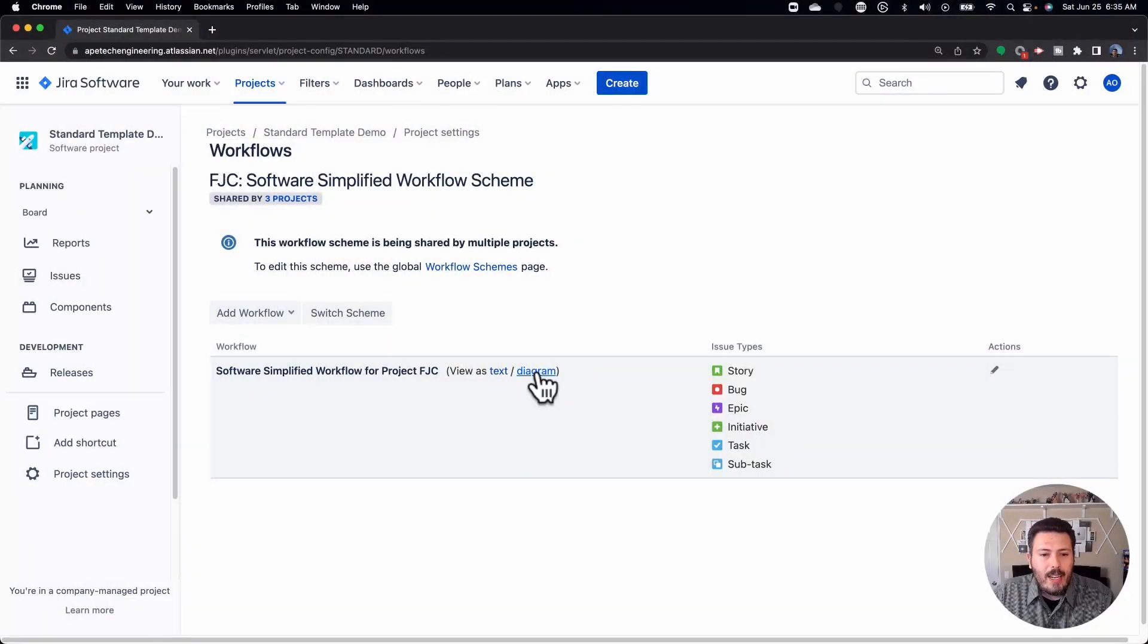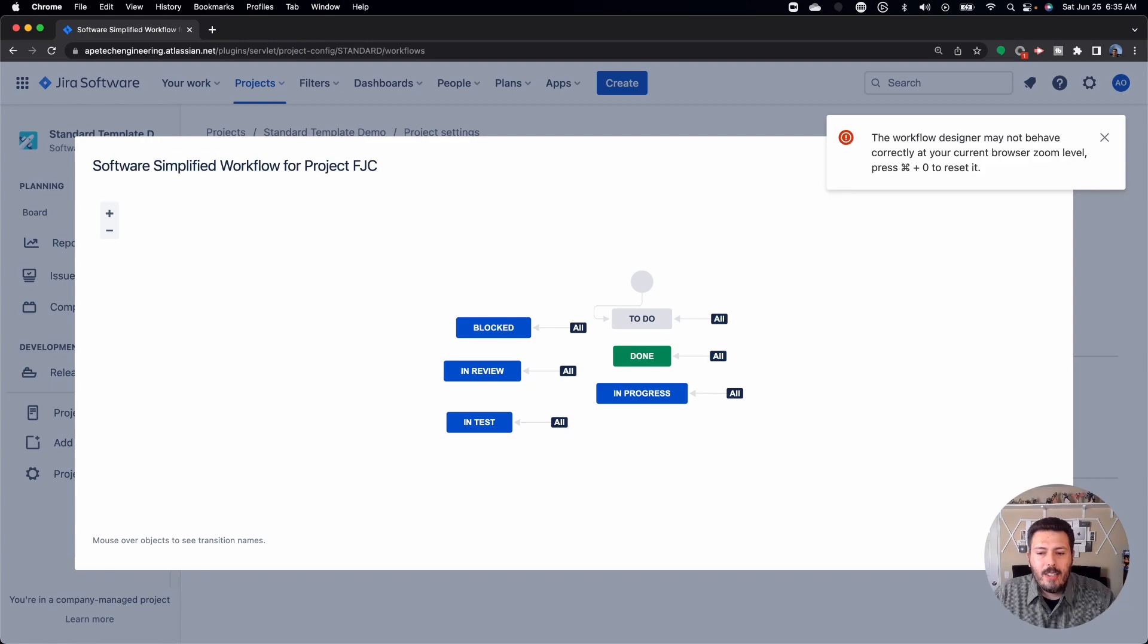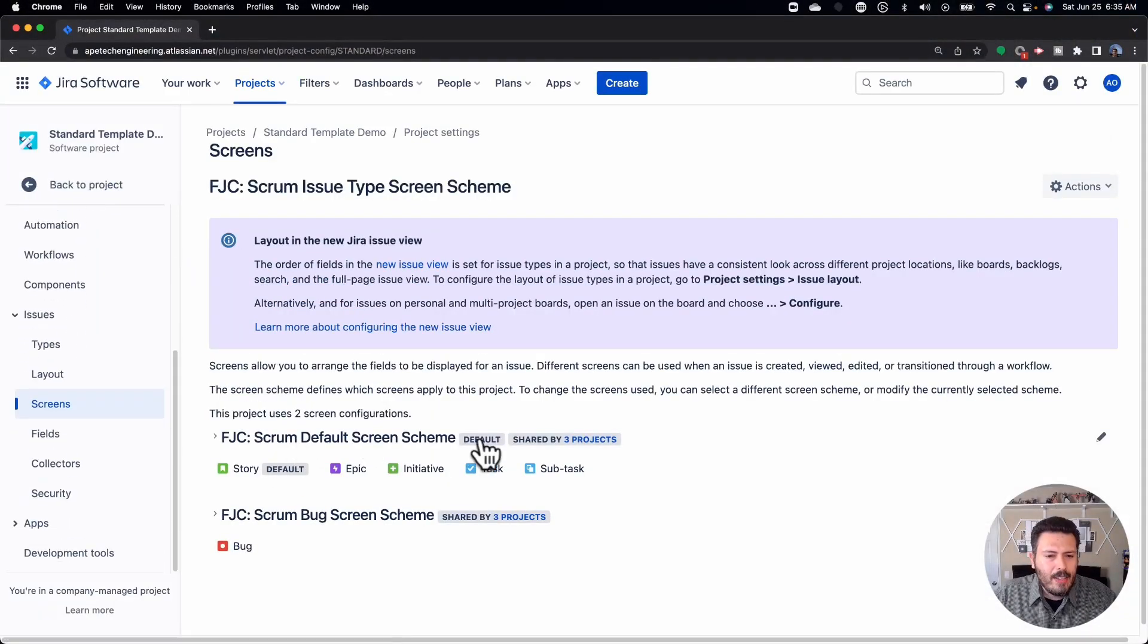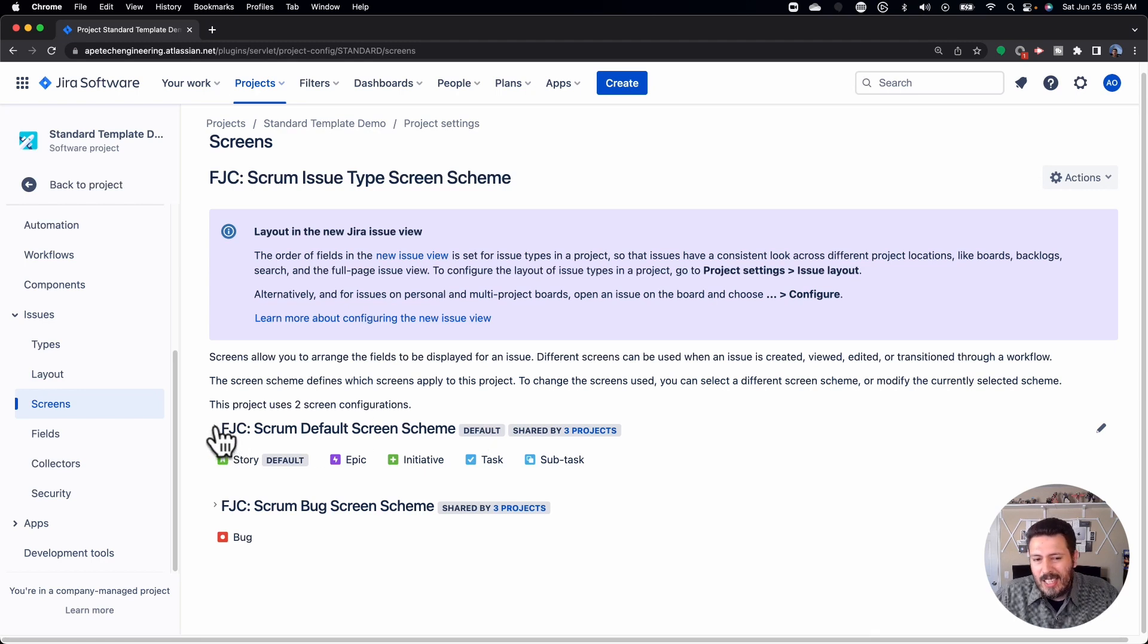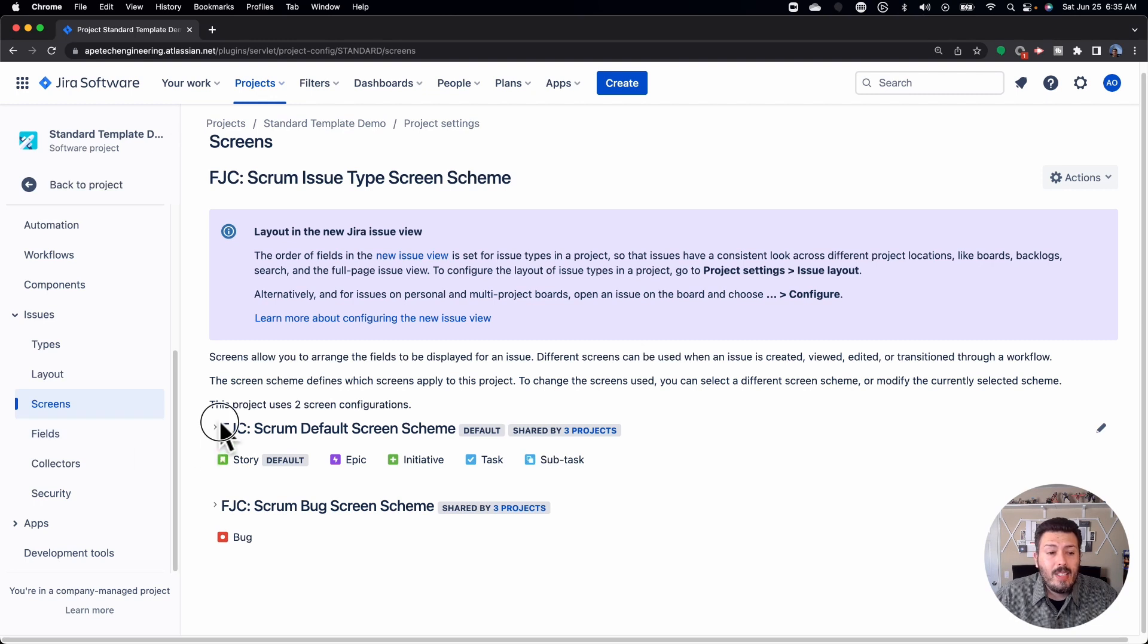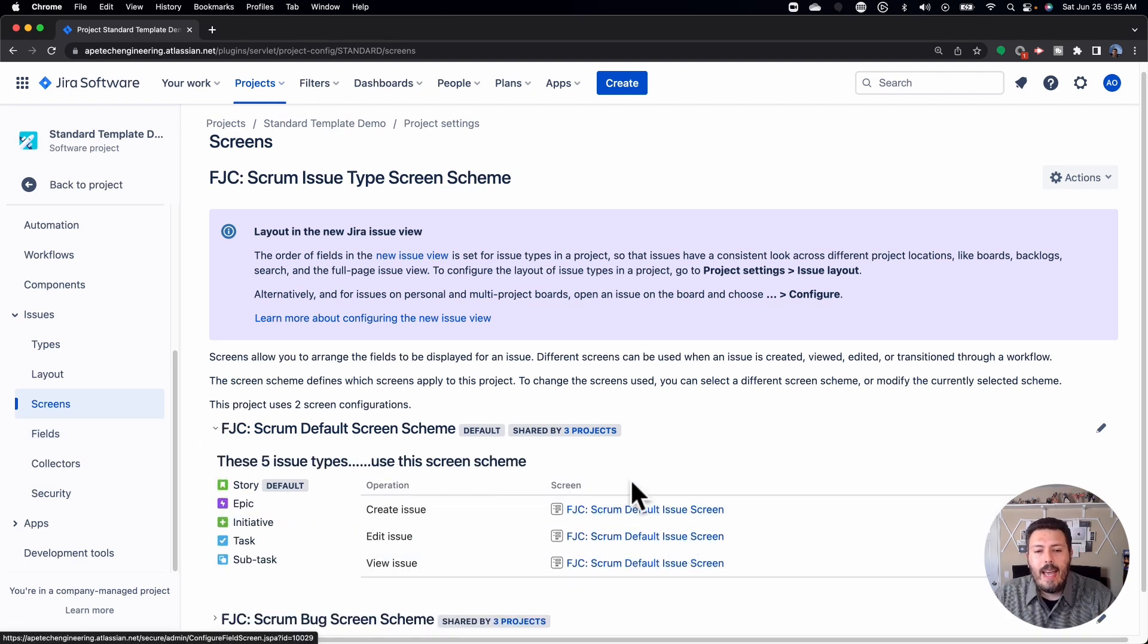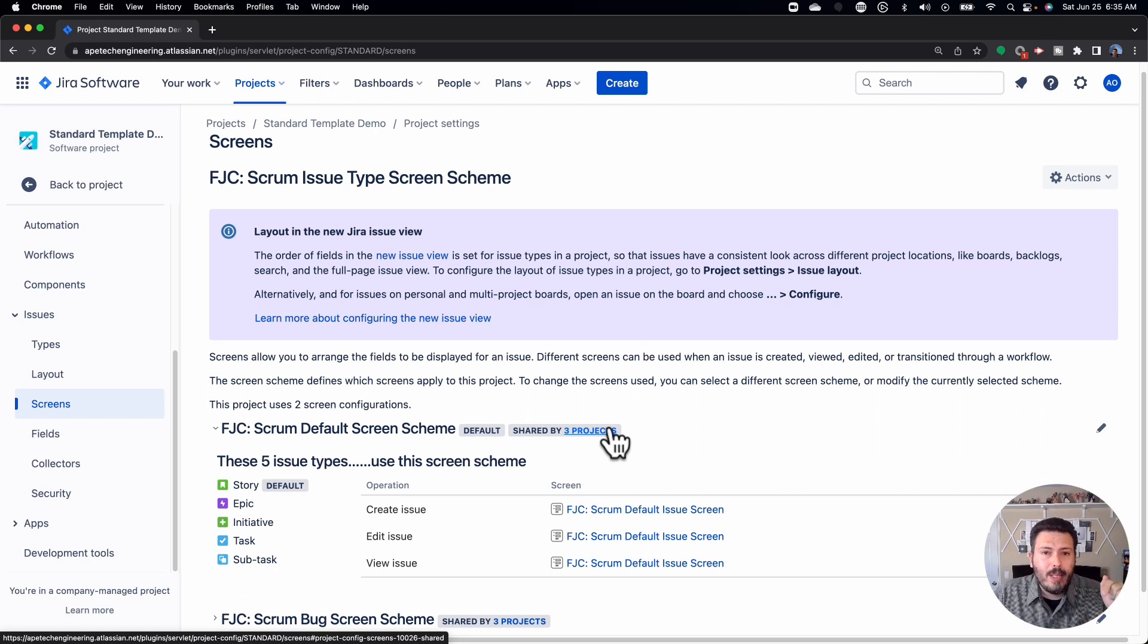The workflow is a common occurrence of folks going, you know what? I want an extra status in my workflow and just drop one in. And my usual response is no, because if I do that, if I drop in another status here, I'm inadvertently adding a new status for everybody. So sometimes you don't want to do that. And the other common complaint that I get or request is on the screen side. Right. So I'll get a request where I have a user that essentially wants a new field. Maybe they want a new definition of done. They want a new custom field. And this basically means that when I add a custom field to this screen, I am essentially adding that custom field to all the projects. And so sometimes that's not an intended thing that you want to do. And so this could be really bad.